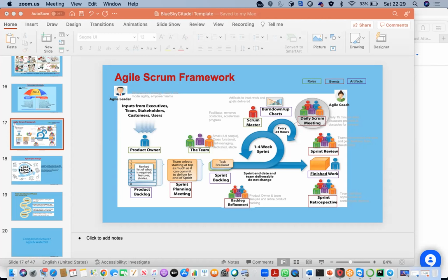I'm following. So if it's a 10 working day sprint, which is 2 weeks, let's assume that we have developers that have estimated 50 story points. We've estimated that these people would deliver 50 story points in this sprint. Now, the burn down chart is a graphical representation that comes from the tool you are using. You are not the one to draw it. The tool itself gives it to you.